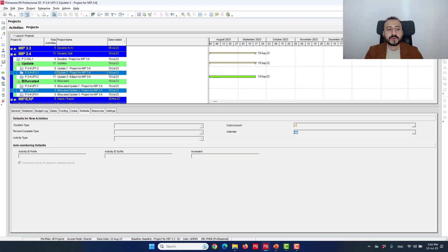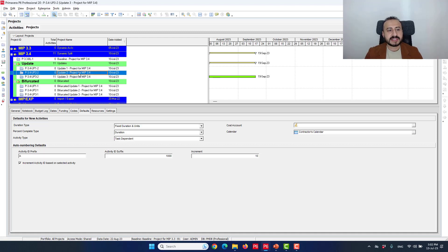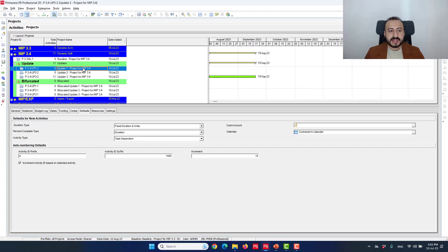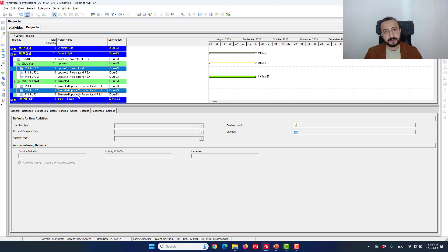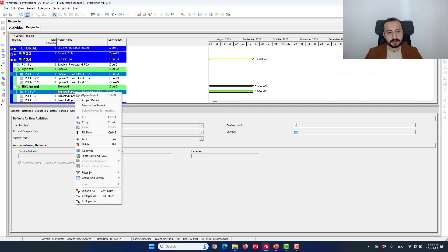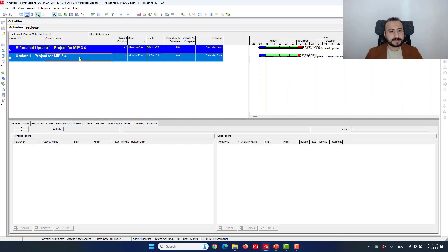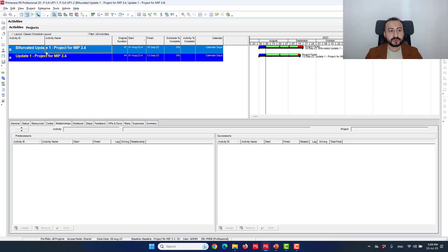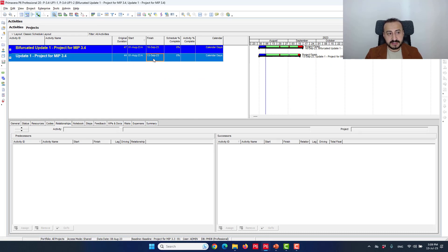Let's look at one example. It's going to be the same process, but the only difference is I'm having this extra dimension of analyzing the delays before any schedule changes. So let's assume that I have done the analysis between update number one and the bifurcated update number two, the way I showed you in 3.3. To show you an example, I want to open both files at the same time — update number one and the bifurcated update number one. If I collapse all, I will see that the bifurcated update completion date is different from the update itself.